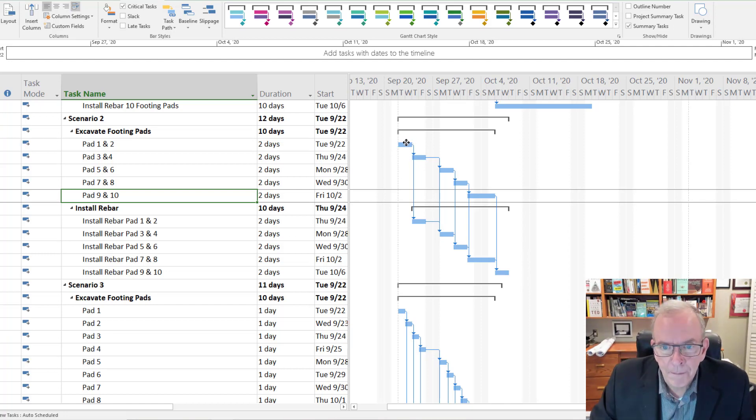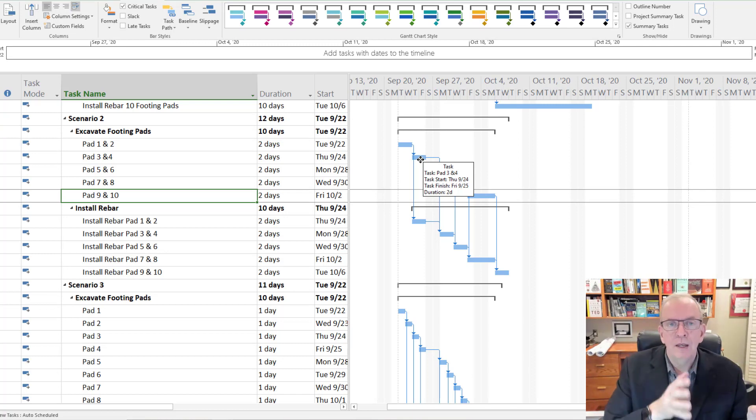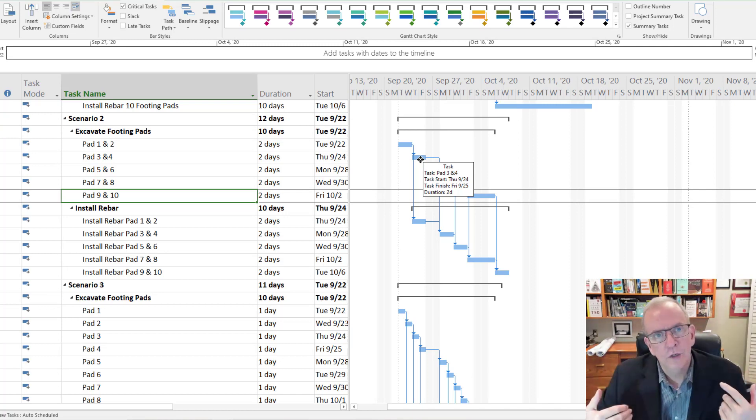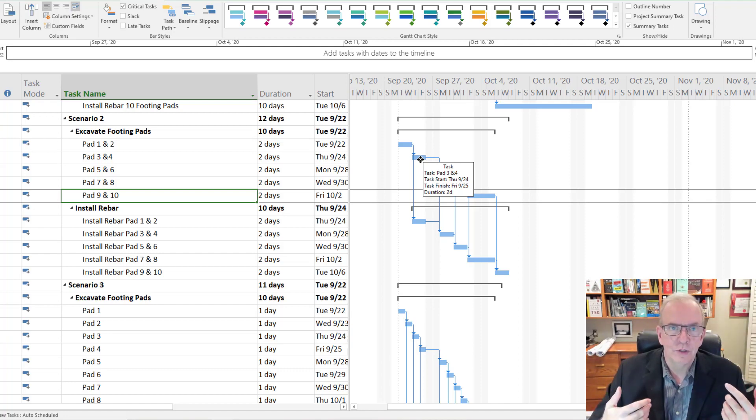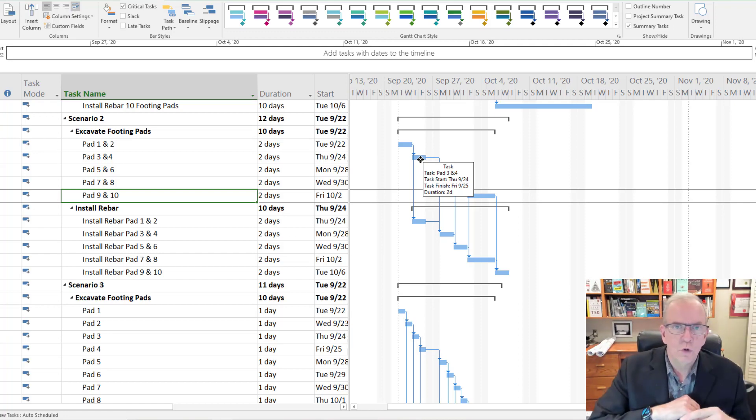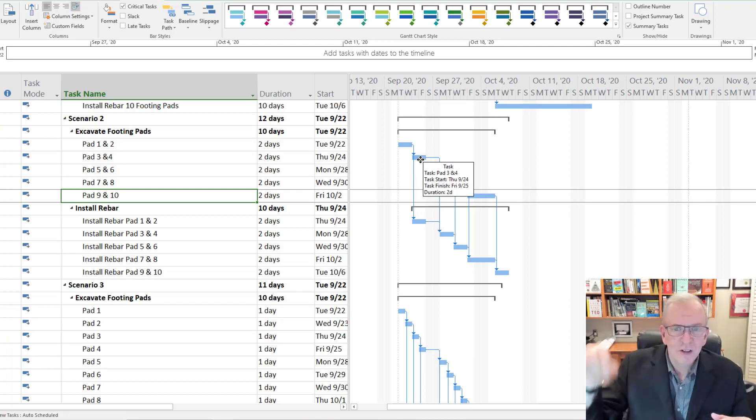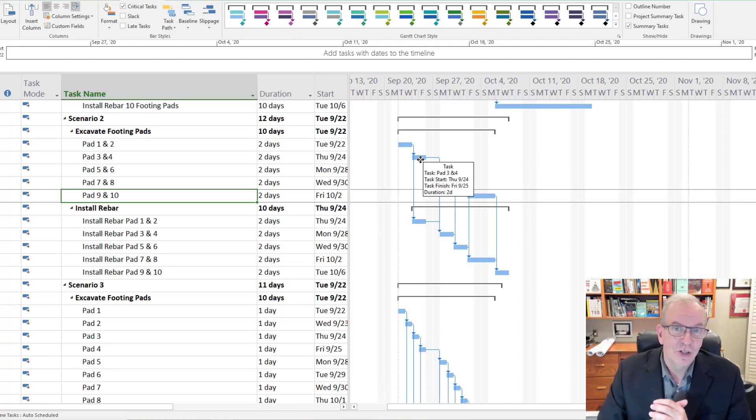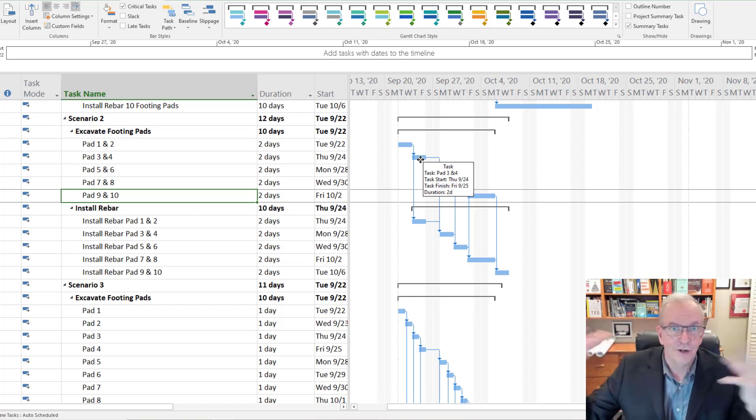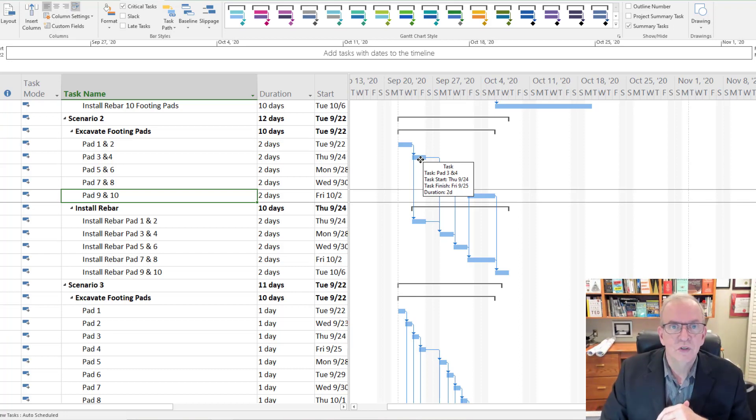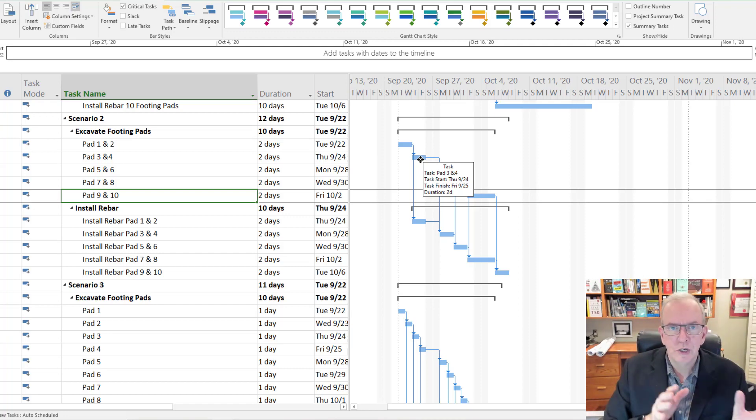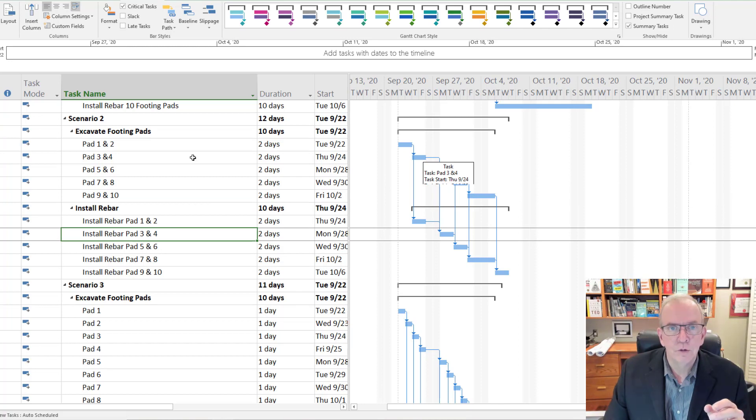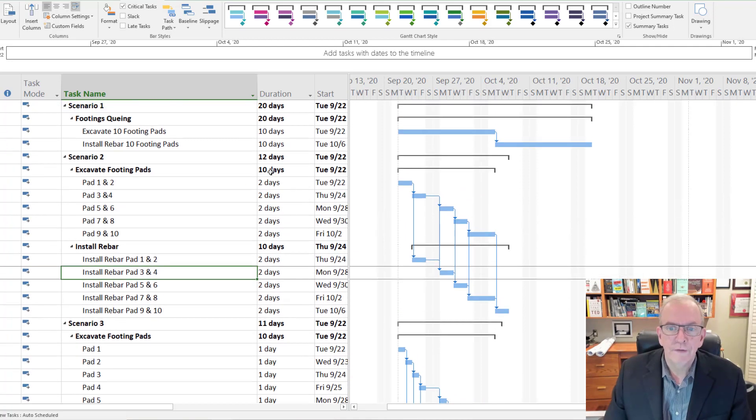That really means you want to get those trades to commit to doing that aspect. You plan the zones around what they're capable of doing and that you're going to have an even flow. You make sure that the trades provide the right amount of resources in the sense of people, resources in the sense of equipment. The goal is not to try to do the zone as fast as possible. This is where you want to have, this is that Navy seal saying slow is smooth, smooth is fast. You want to have this nice, even, steady flow. Nobody's rushing, nobody's creating dangerous situations, but there's a nice, even, steady flow to the work.